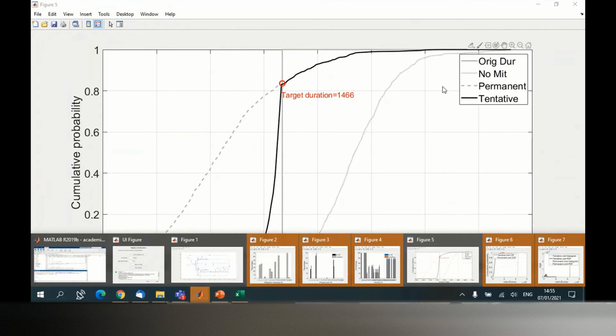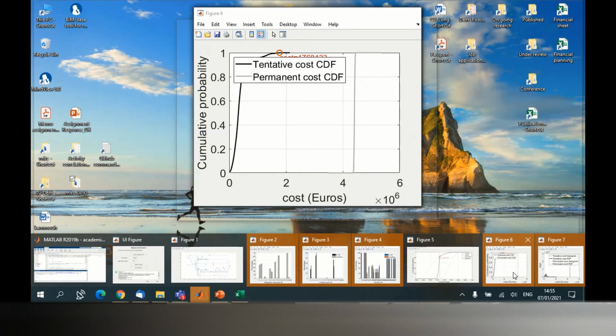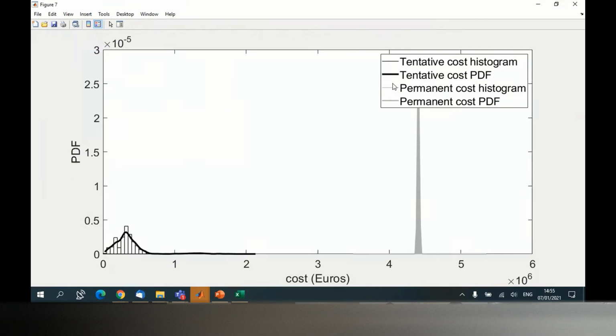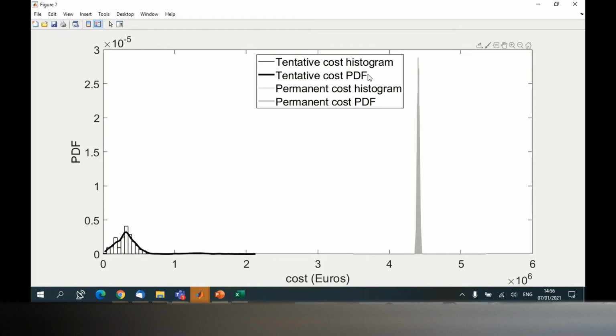All right, so now we saw this S-curve, and let me show you some results about the cost. I told you you execute mitigation measures, but these measures cost you something. If you want to employ some extra personnel, get more resources or more material, you have to pay for them, because they will help you reduce durations. Because the mitigation controller is only going to choose effective measures, you are going to pay less than when you implement all the mitigation measures, of course.